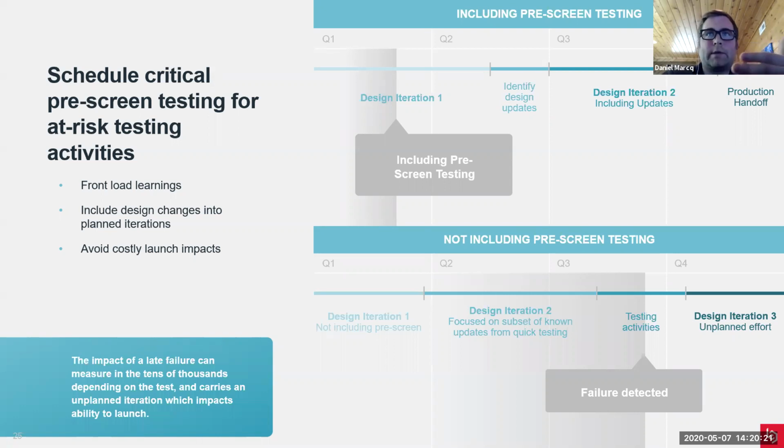And that takes 3 to 4 weeks already. And then you have to schedule to get back on site. That takes another 2 weeks. So again, already you've stacked up 2 months worth of dead time on the end of a program. And that's not a good place to be if you're trying to launch quickly, especially with the way that IoT devices work today. Everything's connected. Everyone's trying to get to market quickly. As soon as you start having delays, someone else jumps in and takes that market share.